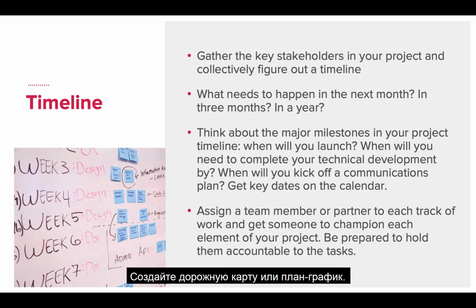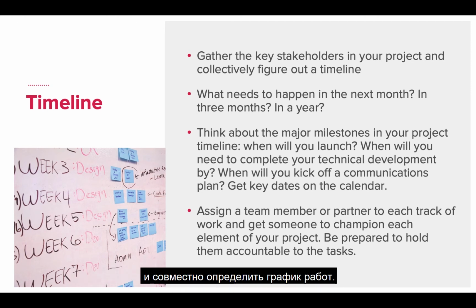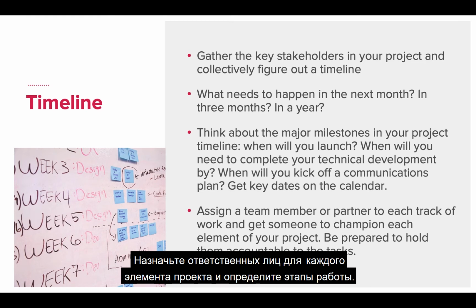Make a roadmap or a timeline. Road mapping is a chance to gather the key stakeholders in your project and collectively figure out the timeline, determine who is responsible for each element of the project, and establish key milestones.